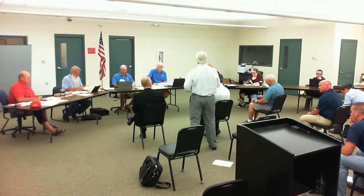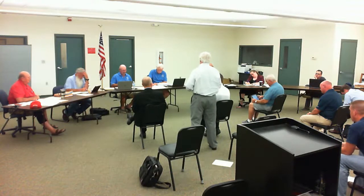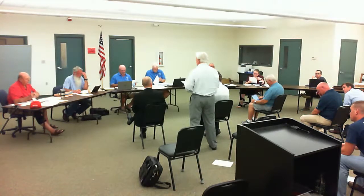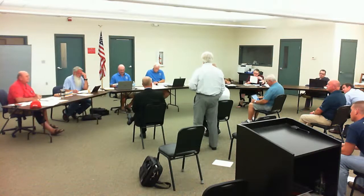So they allow you to go back 60 days from the time you issue this, plus professional fees and things like that are a separate category you can reimburse. But generally for hard cost things, you go back 60 days from the adoption of this resolution and you can reimburse yourself. So we put in the projects here a not to exceed amount of 14.5, which is a little high, that maximum so you don't go above that. And this establishes your intent under federal tax law. So I would need a motion to approve it and then a vote. And then I get 2 copies signed, that'd be great.